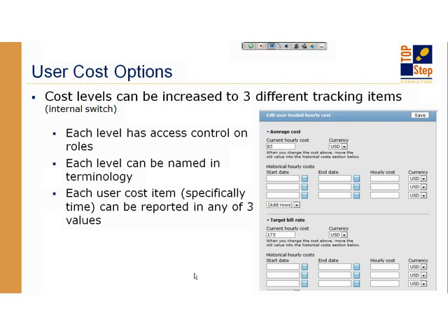And they would never be able to run a report or see any costs that are in a different bucket, for example. So there's a big advantage to implementing more than 1 cost. And for those of you who are curious about how that's turned on, it is an internal switch. You do have to email OpenAir support and ask them to increase the cost levels on the user from 1 to 2 or 3. The maximum is 3 right now.